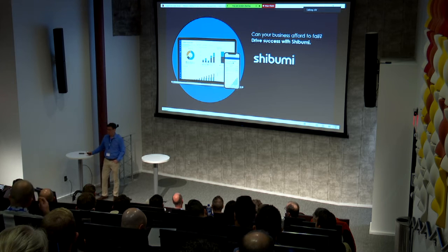Yeah, we've seen, so again, this is an example, right? We are tracking the individual resources, and that's how we define the capacity rolling up into a resource pool. But if we're tracking large numbers of resources, often enough, the customer won't even track those individual resources. They'll just have a pool, and they'll type in a number of how many resources they might have. So if you wanted to, you could just do it that way. You could just specify that I have a pool of developers and there's 100 of them. And we've seen that where they're registering demand against a larger pool and they're not really interested in the individuals.